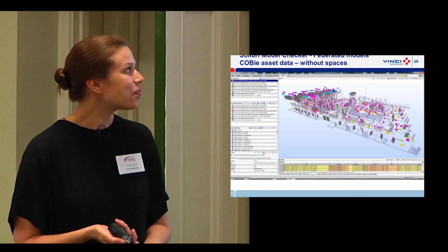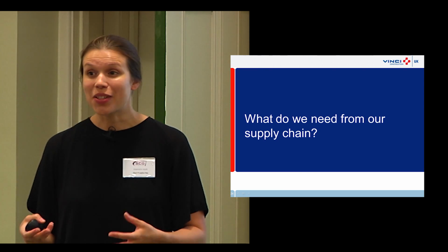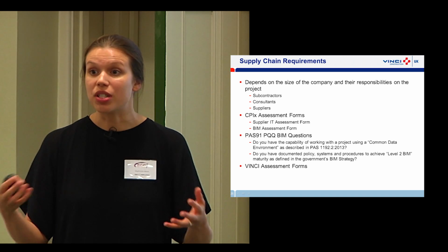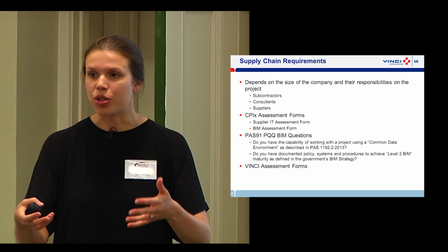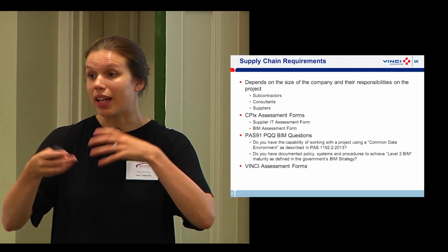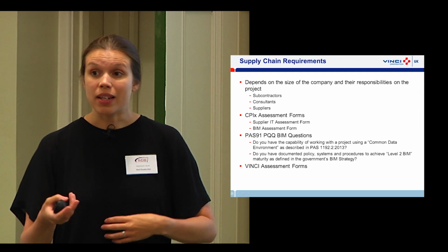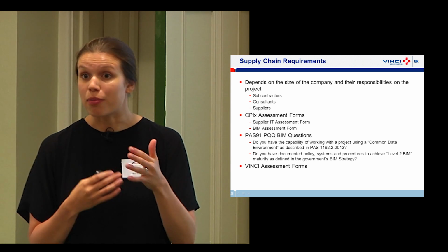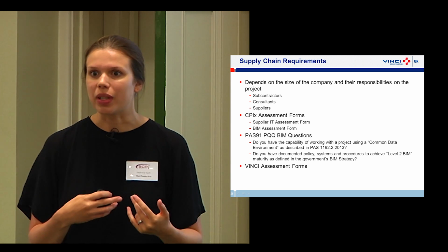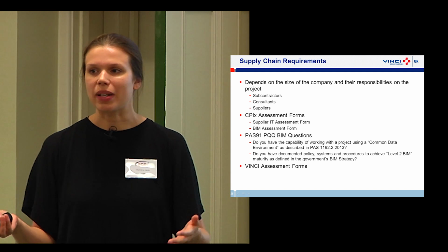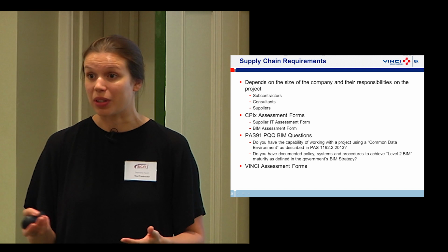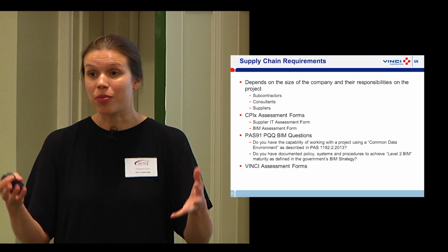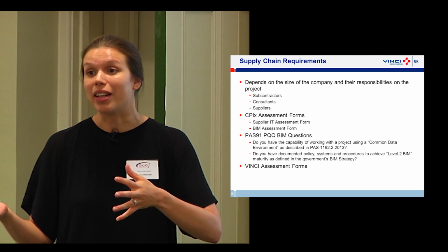So what do we need from you guys? This depends on the size of the company. So we expect that our subcontractors, our major subcontractors, are able to deliver 3D models and support us in producing information models as well, so adding that manufacturer data. But from our smaller suppliers, all we expect is that we get those attributes, those asset information from you guys in a meaningful way so that we can add that information to a 3D model. We're not expecting that our small suppliers produce 3D models because you guys don't have that 3D modeling resource, and the resource to actually buy the software as well.